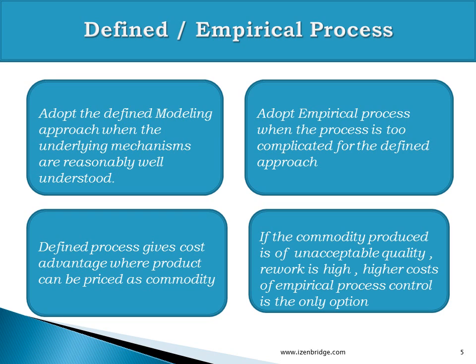For example, if you are creating a new product, new software, where the requirement is not yet visualized or felt by the end user, and you go with the initial scope statement which you have received in a way that everything is predictable, you may end up producing something which is not acceptable, not desired by the end customer, because you applied the defined process to a problem where the output was not yet fairly defined.